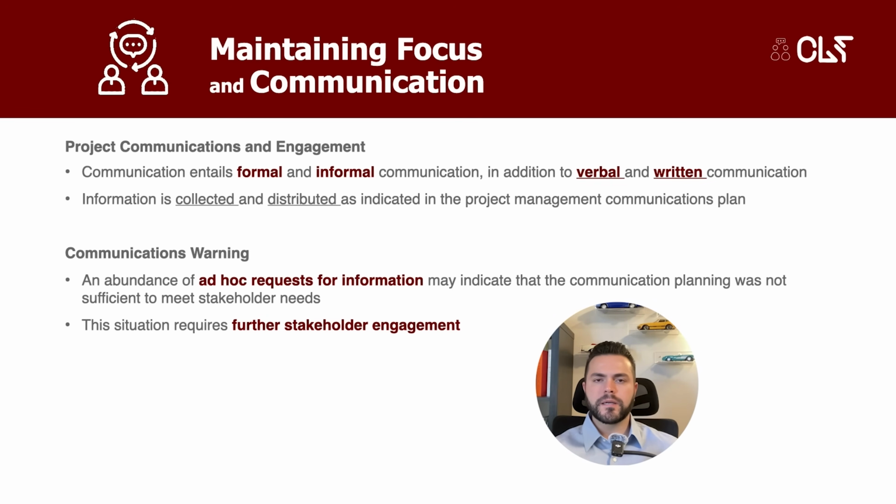On the communication front, project communications and engagement require management of both formal and informal communication, in addition to verbal and written communication. Information should be collected and distributed exactly as indicated in the project management communications plan. And here is a communications warning sign to look out for. If you start seeing an abundance of ad hoc requests for information, it may indicate that your initial communication planning wasn't sufficient to meet stakeholder needs. And this signals a necessity for further stakeholder engagement.